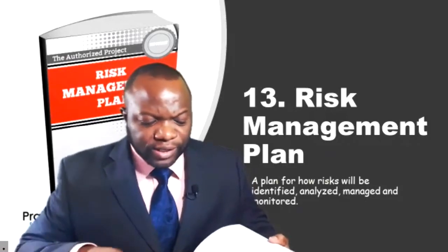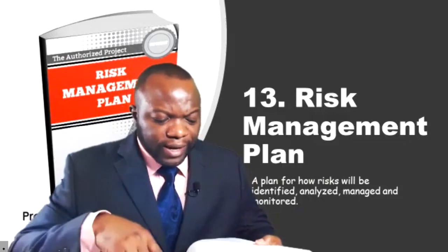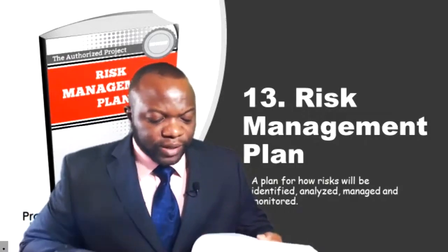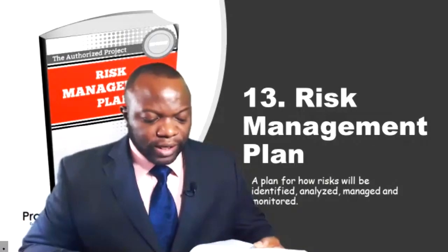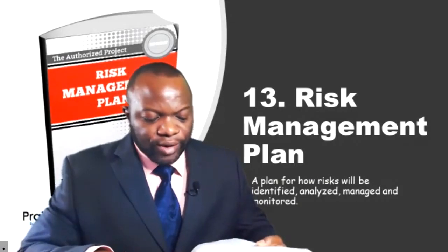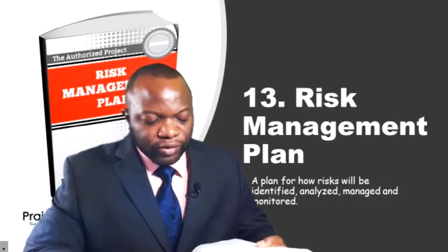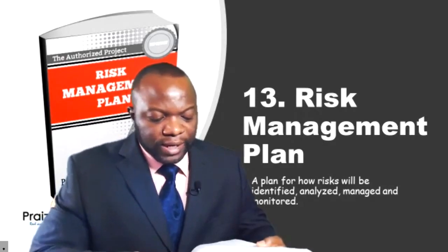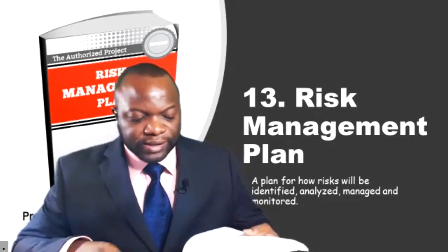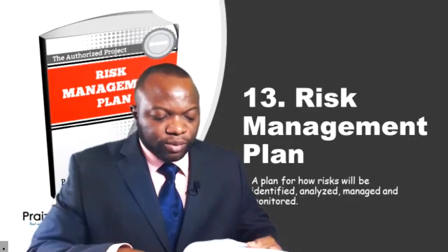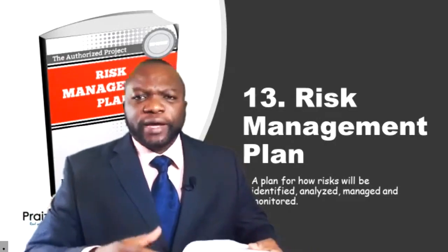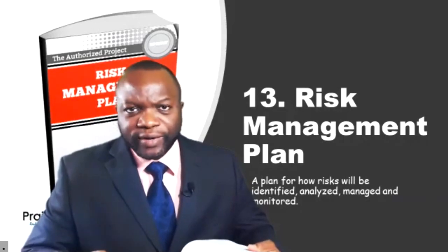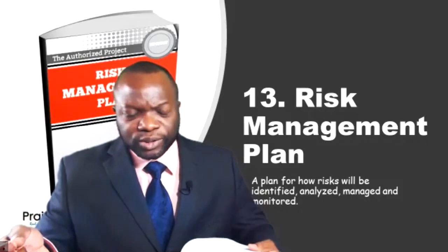It says the risk appetites of key stakeholders on the project are recorded in the risk management plan as they inform the details of the plan risk management process. In particular, stakeholder risk appetite should be expressed as measurable risk thresholds around each project objective. Watch this. These thresholds will determine the acceptable level of overall project risk exposure, and they are also used to inform the definitions of probabilities and impacts to be used when assessing and prioritizing individual project risks. In other words, the acceptable level of overall project risk exposure that a stakeholder is willing to take on to get fed, to pursue the opportunity, to be satisfied. So you have to link the appetite to the opportunity.